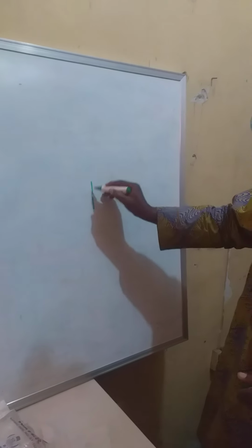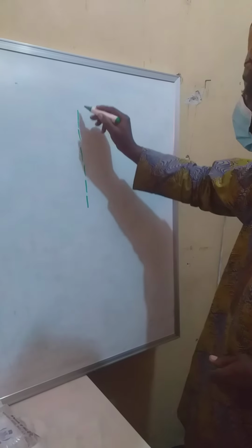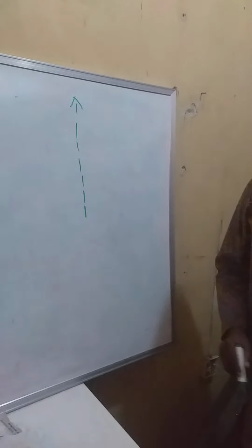But in terms of what they are meant to achieve, they are just meant to say that I am linking the end of one event to another event so that another activity can take off. It's always like that. It's represented with a hyphenated line. This is a dummy.